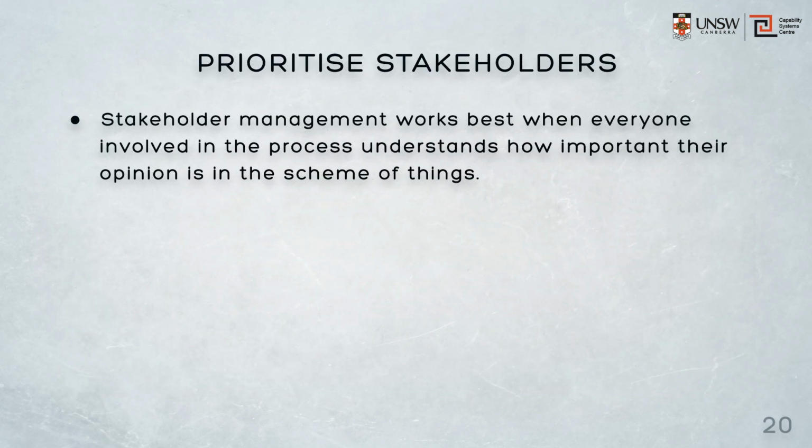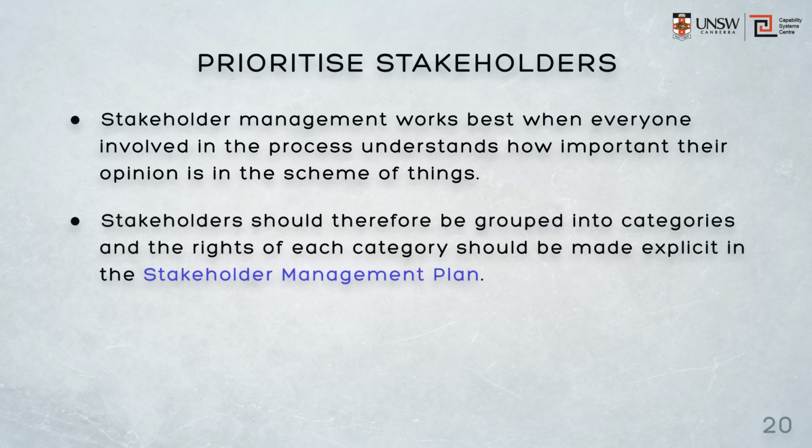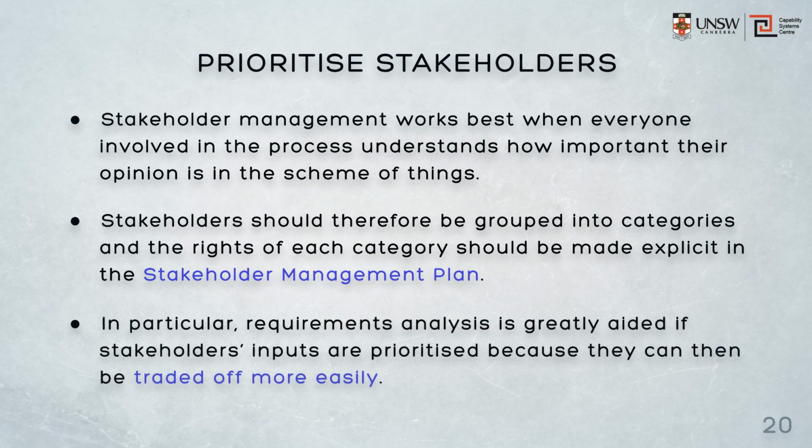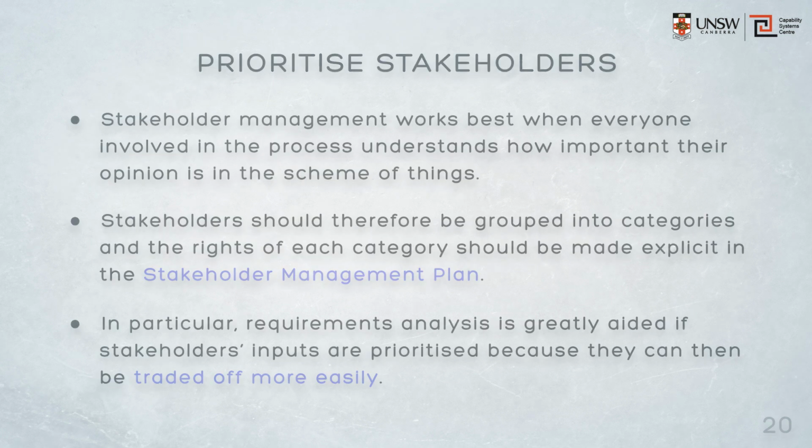Stakeholder management works best when everyone involved in the process understands their place. That is, they understand how important their opinion is in the scheme of things. Stakeholders should therefore be grouped into categories, and the rights of each category should be made explicit in the stakeholder management plan. In particular, requirements analysis is greatly aided if stakeholder inputs are prioritised, because then they can be traded off more easily. Design spaces are much more easily accommodated if some dimensions have more weight than others.